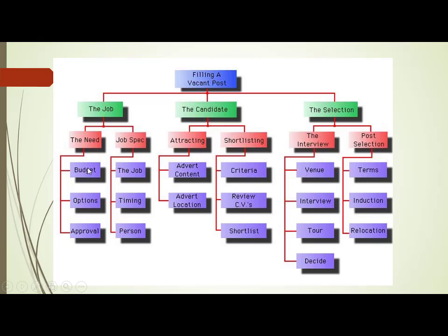But again, within this budget, we have not defined the activities. See, when I say budget, it is only the work, that's all. But what is inside that work, we don't know. So what we have to do now is, we have to take this work package called budget, and decompose it still further and identify the activities to be done to accomplish that particular work package called the budget.